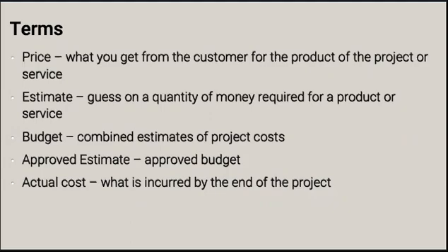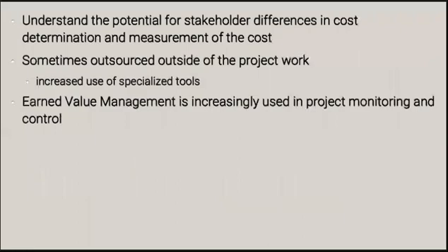So in general, the budget shouldn't be more than the price, to keep some sort of a profit margin. So price is the maximum price. Price gives us what the maximum budget should be. If the budget is greater than the price, maybe investing in the project isn't such a good idea after all.